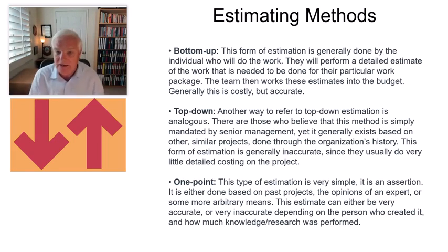Top down is another way, and this is typically done in what I'm going to call a formula where you kind of do a little bit of both. Top down would be, I just tell you, similar to what you got for ECS, you've got a budget of $250,000, okay? That is your budget. That's top down. I didn't tell you that I parsed it. Spend this here, this here, this here, this here, this here, this here. You have to do that, but a top down would break that down into each one of those work packages.